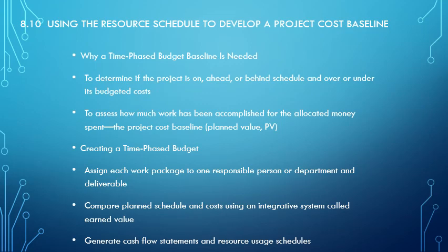Using the resource schedule to develop a project cost baseline. So why a time-phased baseline is needed to determine if the project is on, ahead, or behind schedule and over or under its budgeted cost. So here's what we expected to spend by week 4 and how much did we actually spend. And then you're going to do things like assess whether that amount you spent got you the work done that was needed. Or is there a gap in it to actually do the project? Did we need more labor or more cost of some sort than what we had budgeted? And so now we're over and we need to figure out how we're going to manage our budget as we go along. And then it's this time-phased budget.